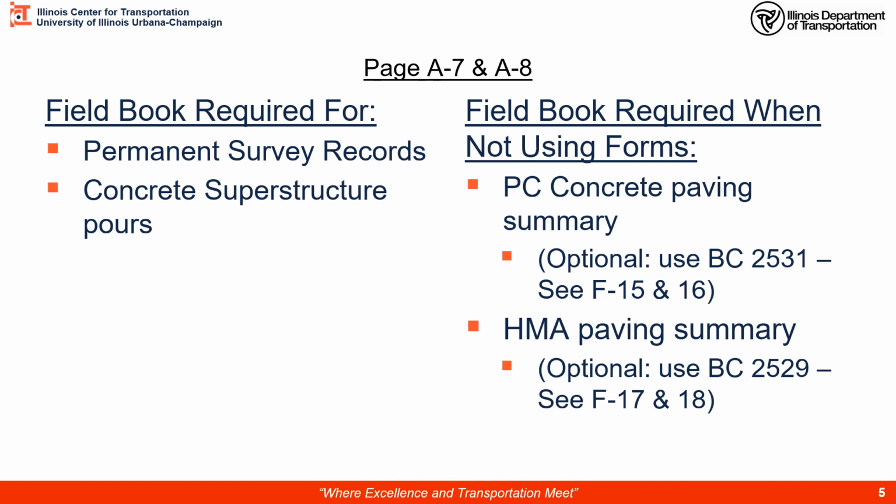Field books are also required when you're not using pre-printed forms for PCC paving, or Portland cement concrete paving, or hot mix asphalt, HMA paving. If you are using one of these two pre-printed summary forms, you do not need to use a field book.